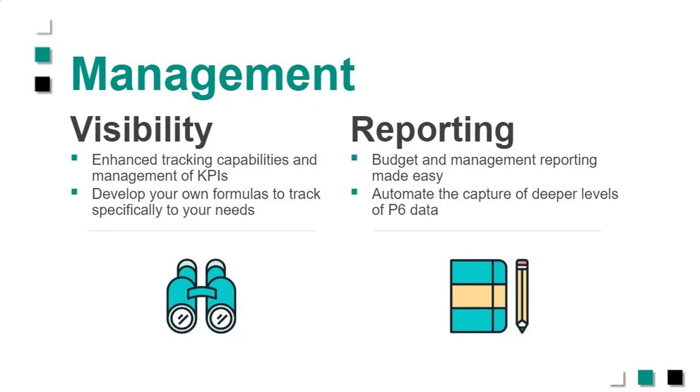Now, the reporting that we can get out of here is a huge benefit. Okay, if we can understand whether our margins are being eroded on some activities right now, it means we need to start to find a way to get those margins back. Okay, so it might be through some change orders. We might need to try and get a little bit better profits on those, but you need to see that as early as you can, so that you can make sure you don't lose money on the project.